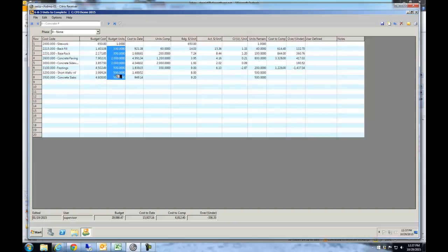The units that I had to do could be lump sum, could be square footage. I'm not sure how detailed you get on your estimates. This is the cost accounting that's plowed in there so far. These are how many units are complete. And so if I look at this top line item real simply, I budgeted $14 a square foot. I'm spending $15 a square foot, which is going to put me about $132 over budget.